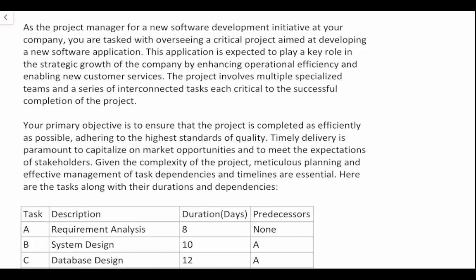We're going to draw the network connecting all of the activities. We're going to assign time or cost estimates, or both, to each activity. And then importantly, we're going to compute the longest time path through the network, which is also known as your critical path. And then finally, we're going to use the network to help schedule, monitor, and control the project. Okay, so this will all make sense in a second.